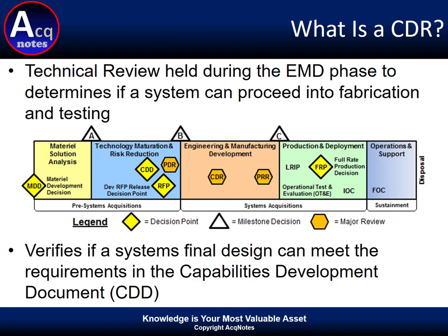What is a CDR? A Critical Design Review is a technical review to ensure that a system being developed can proceed into fabrication, demonstration, and test. It verifies that a system's final design can meet the requirements of the government's Capability Development Document, or CDD.